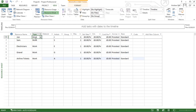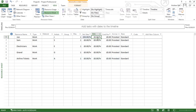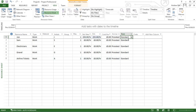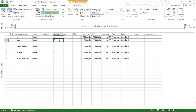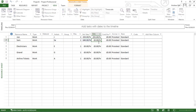Joe is a work resource. He gets paid by the hour. I have one of him, and he's going to get paid £50 an hour, and £55 overtime. He works the standard calendar. Sam is also a work resource. I can shorten these initials to whatever I like. Sam gets paid £40 an hour. He doesn't get paid any overtime. He works to the standard calendar.